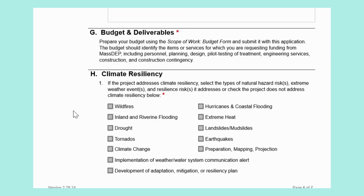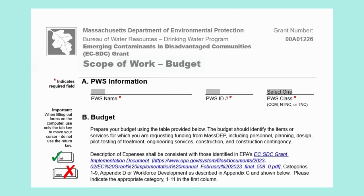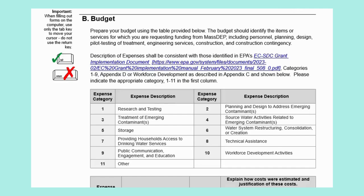Section G, Budget and Deliverables. This section should be completed by all applicants using the separate budget form provided. Similar to the Scope of Work, the first section — Section A — must be completed with PWS information. In our example, the PWS name is Example Water Supply, the PWS ID is 23456789, and it is a community water system. Next is Section B, Budget. This section must be completed using the table below. The budget should identify items or services for which you are requesting funding from MassDEP, consistent with categories 1–11 from the EC-SDC Grant Implementation Document.